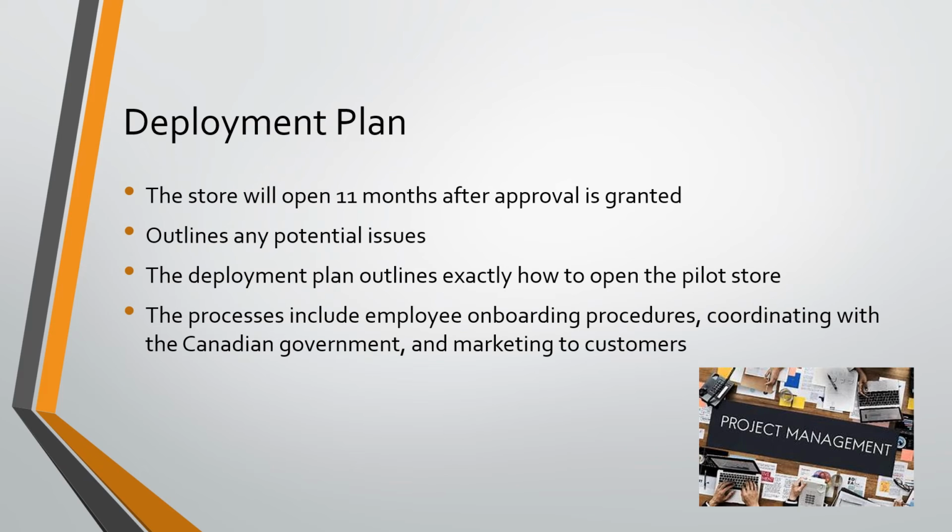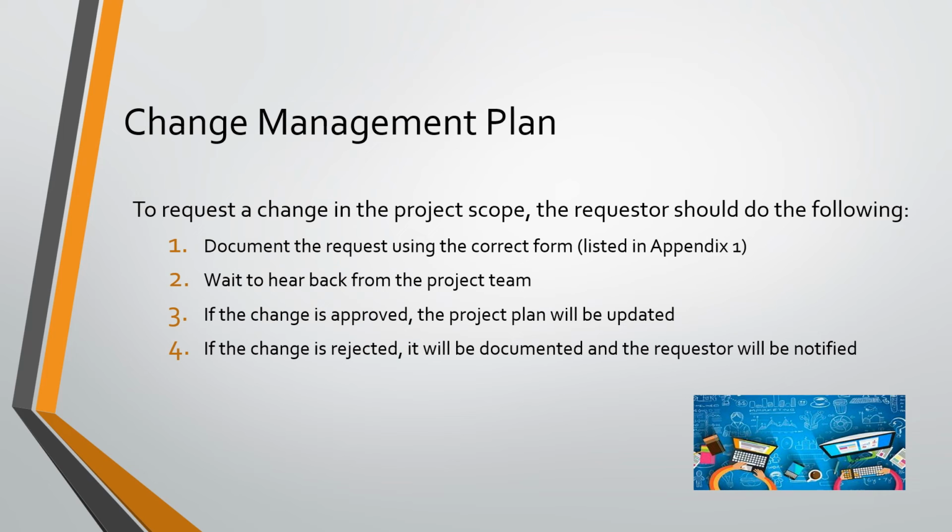The deployment plan outlines how we're going to open the pilot store. It basically says that we're going to open the store 11 months after the approval is granted. It outlines any potential issues, and it includes more specific processes like employee onboarding procedures, coordinating with the Canadian government, and marketing to customers.